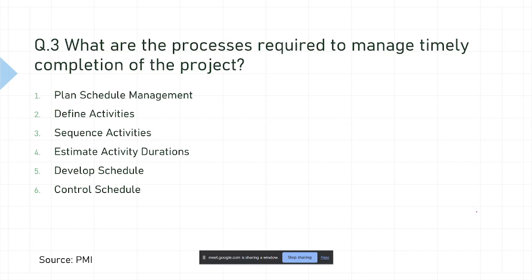Yes, sir. Sir, if we can add one point, as per experience, the more and more number of parallel activities should be visualized. Like sequence activities we have written, the more the parallel activities, the less will be the duration of the completion. Okay. Parallel activities. It's just a view. I'm just asking if it's correct or not.